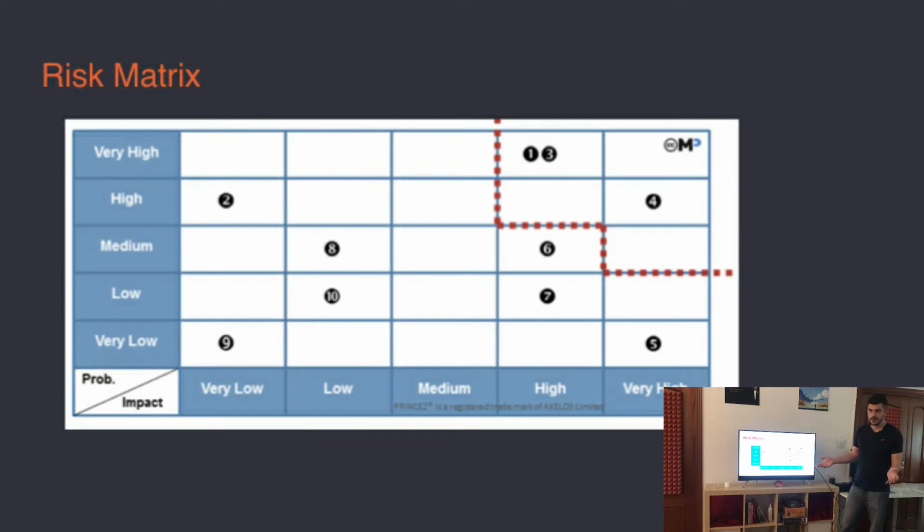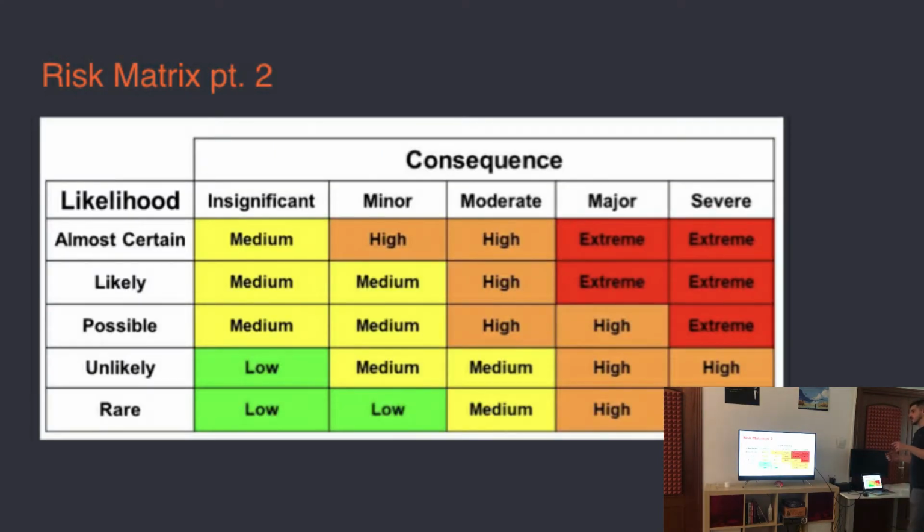So I guess I don't have to explain to you guys how this works. Low impact, low probability stuff you put here, and things that will probably happen and will have a critical impact on our project go here. The rest is in between. So why are we doing that? So we can see which are the problematic parts and which we don't care about. Whenever you are faced with a plethora of risks in a project, you have to do the thing that you always do first: assess the priorities. What thing do we have to take care of first when we have a lot of things?